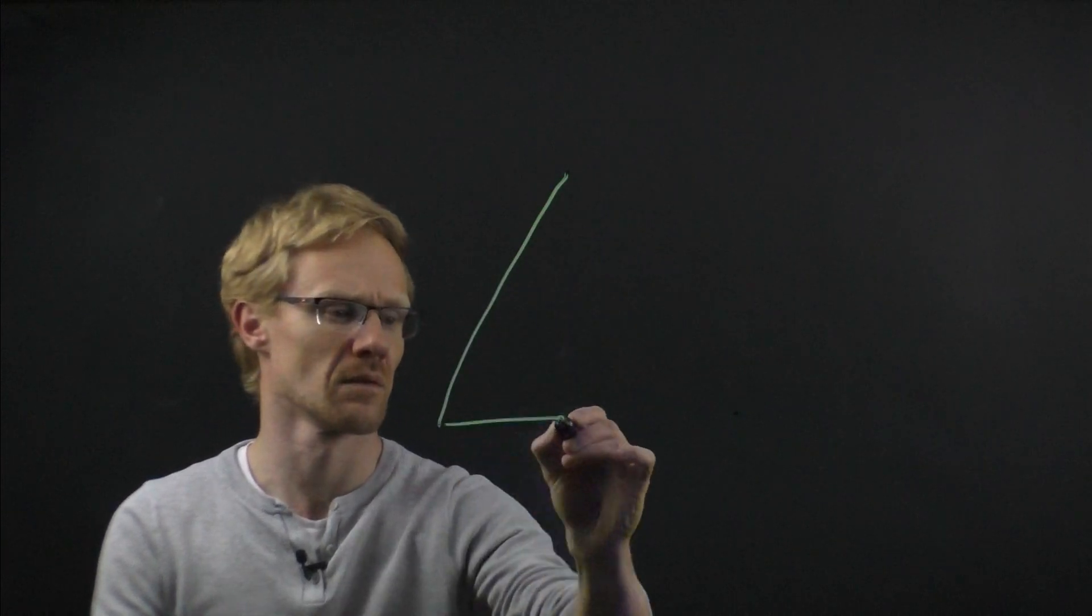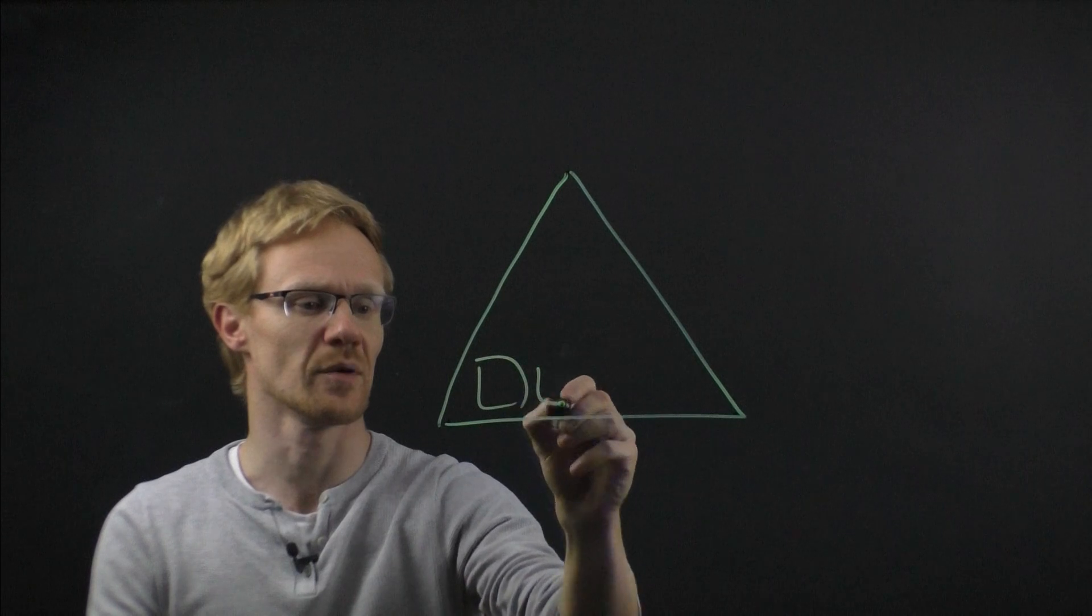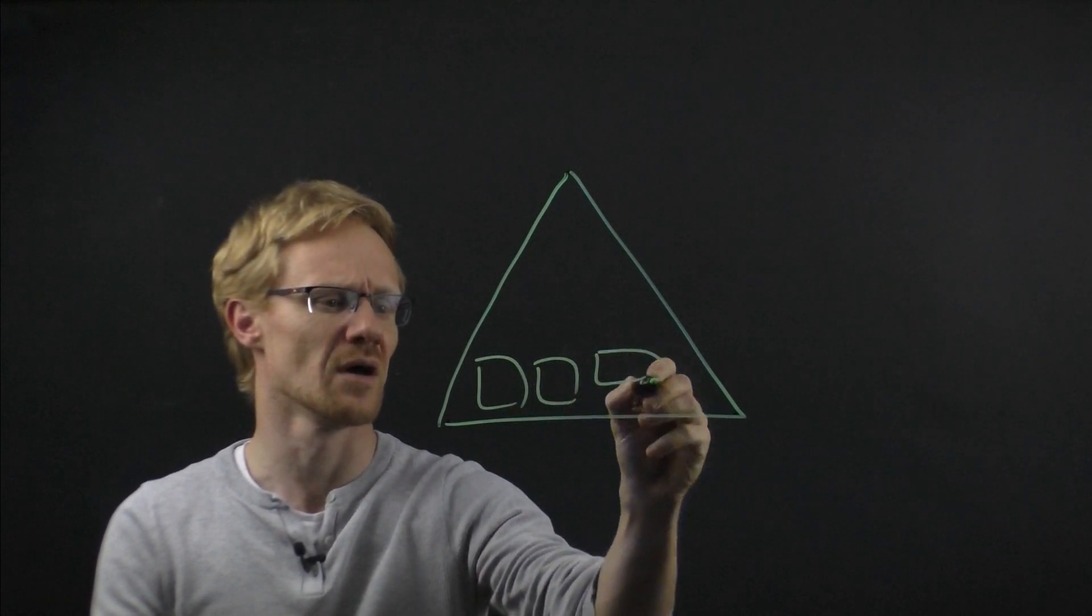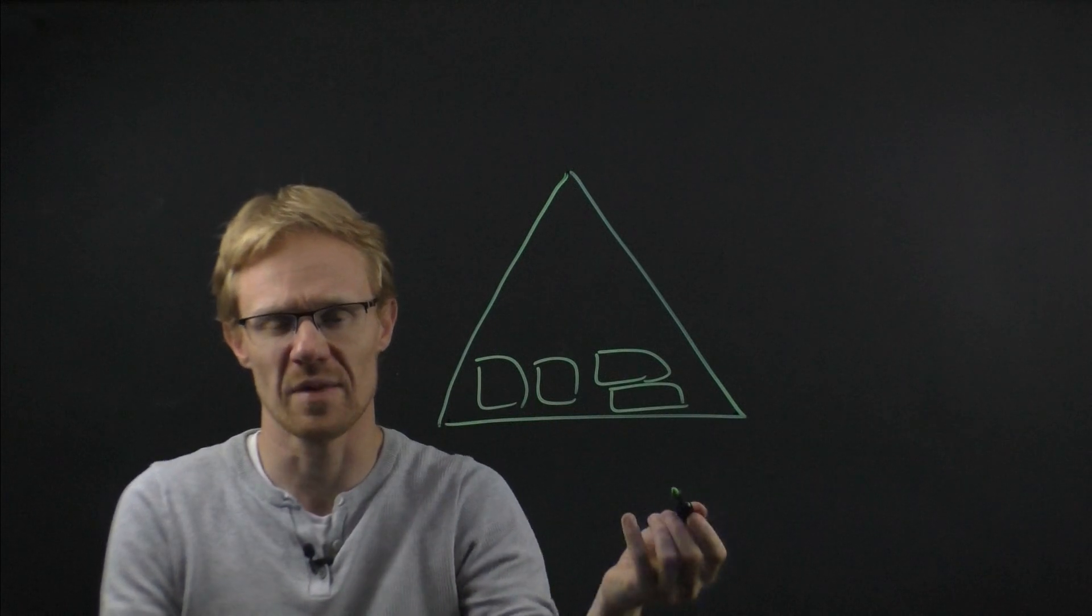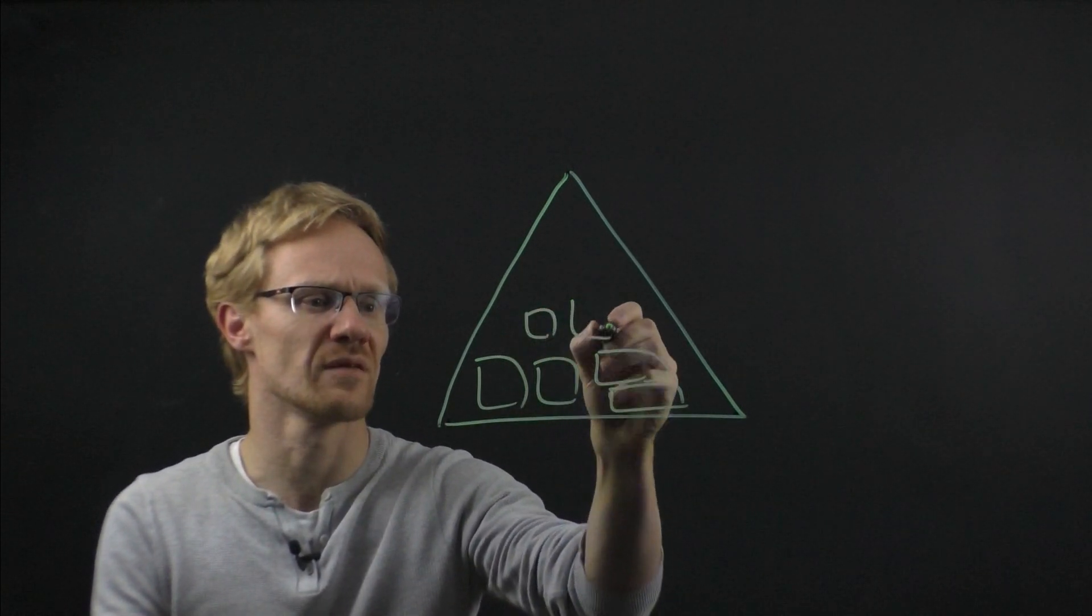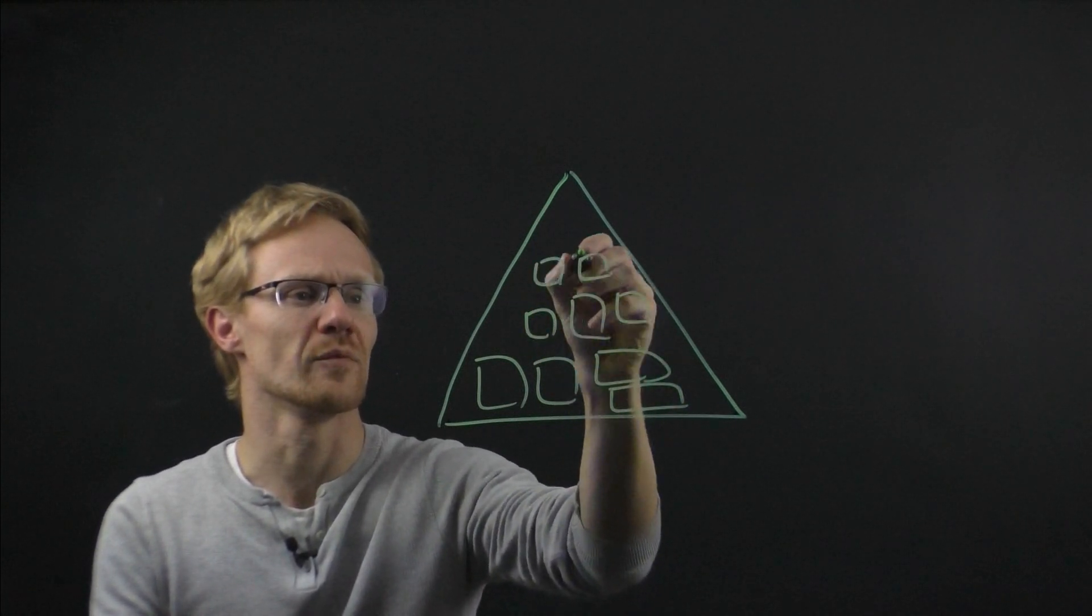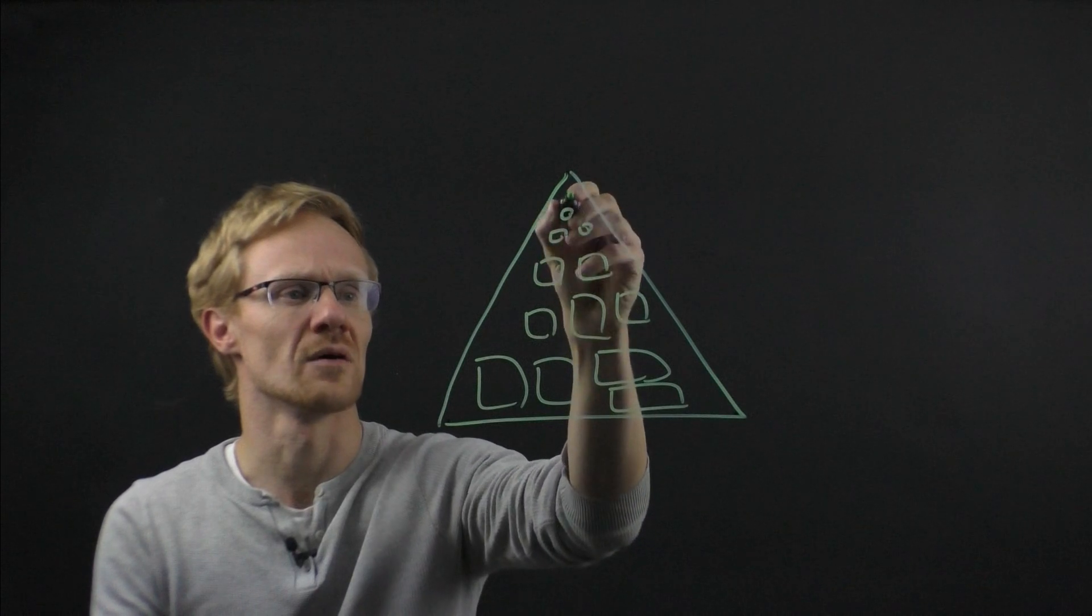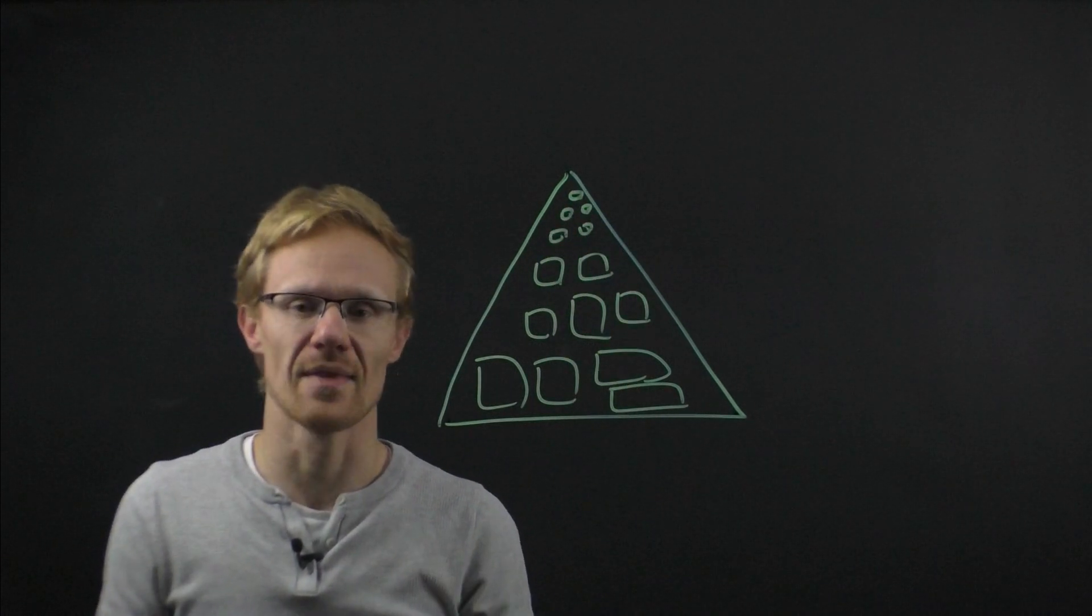So one of the common ways to represent a backlog is as a pyramid like this where you have the large epics at the bottom. These are large, undefined, very big and unclear and vague. That's fine because they are at the bottom and then as you progress up things get more refined and smaller and at the very top you have very small items which are refined, small stories that you can work on in a couple of days and they are ready to go.